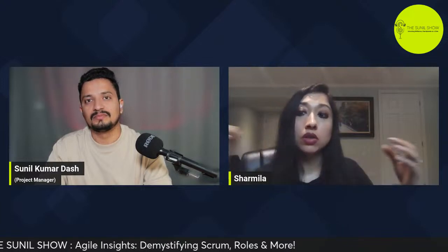And over 2 or 3 sprints, let's say we have covered 30 in the first, in the second we have been able to cover 35, and in the third sprint we have been able to cover around 40 user story points. Based on this, we will be able to take an average of what the velocity of the development team has been across these sprints, right? And then based on that, we will have an estimate of what the velocity of the development team is and how we can progress further.